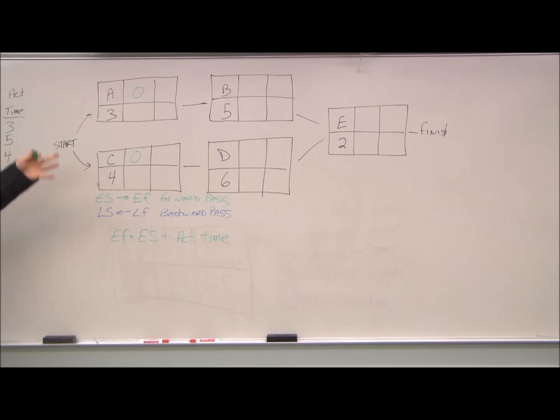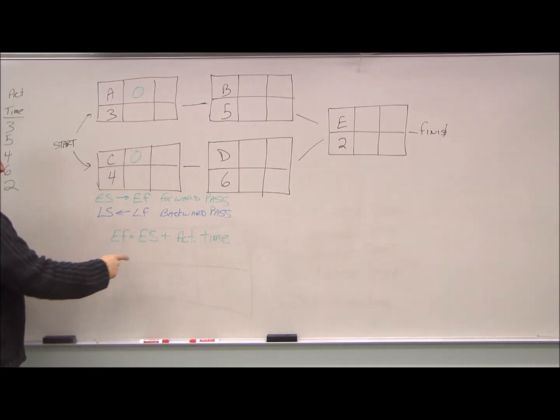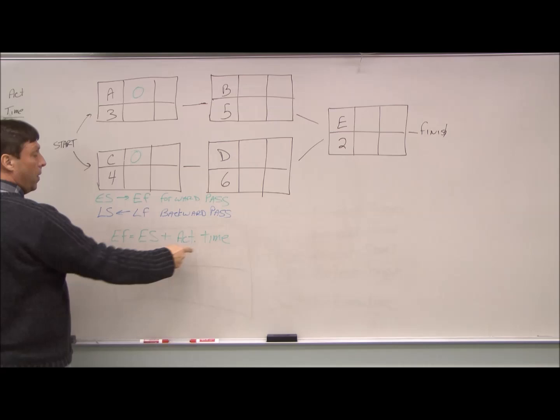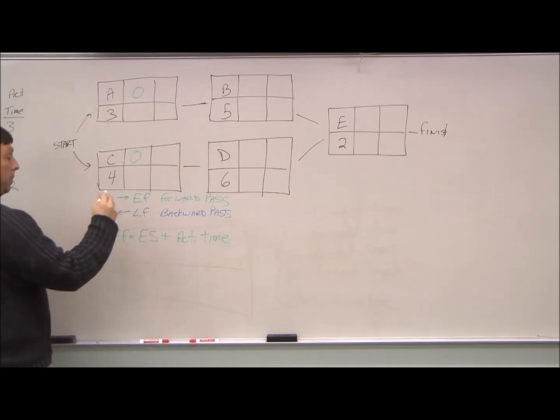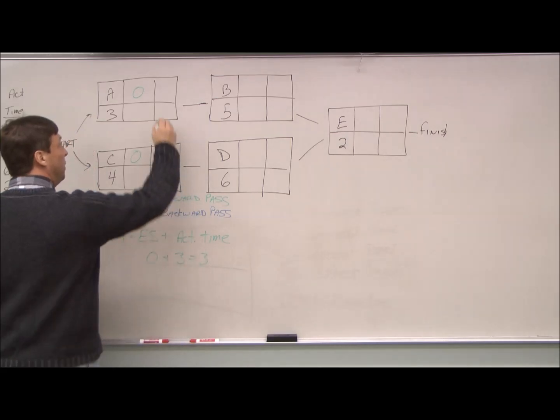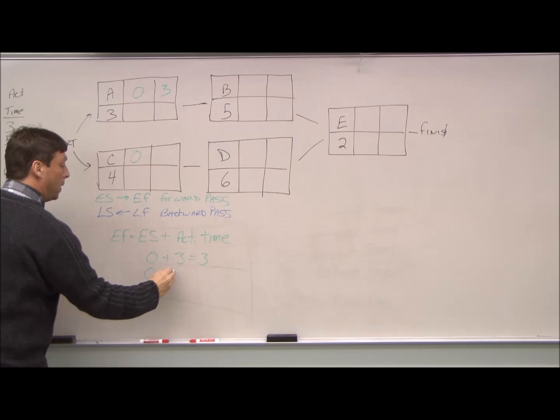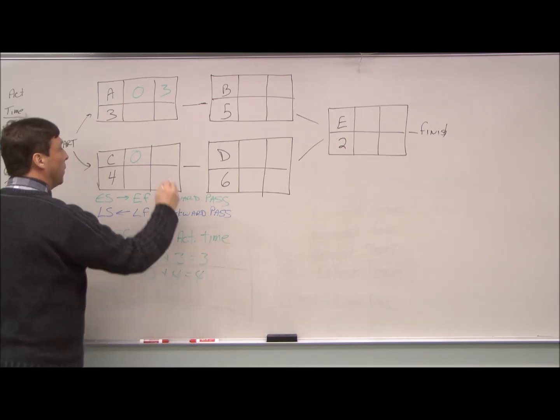The clock doesn't start ticking until we do something on these two projects. From there, we can calculate our earliest finish time by the earliest start plus the activity time. So for A, it's zero plus three equals three. And for C, it's zero plus four equals four.